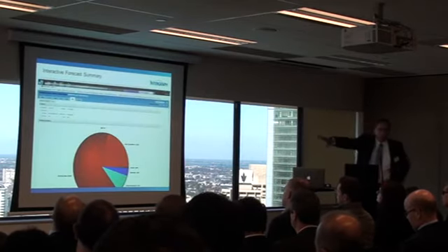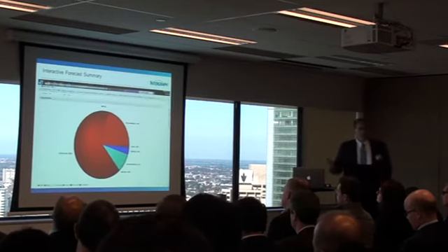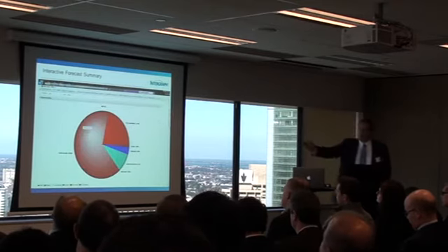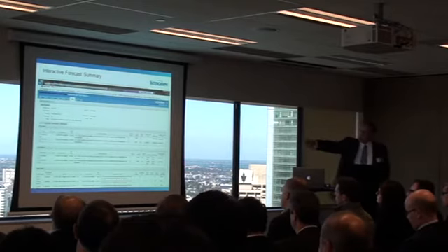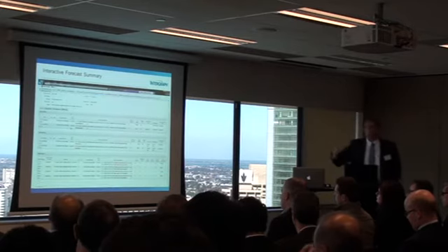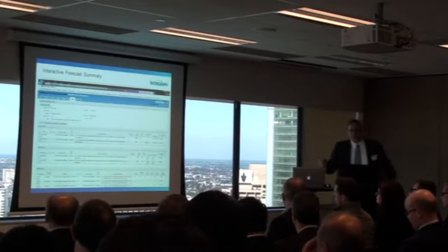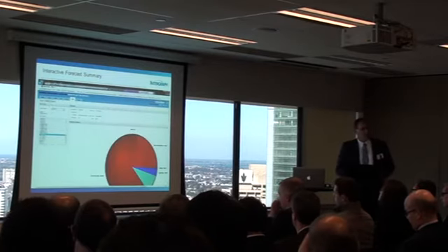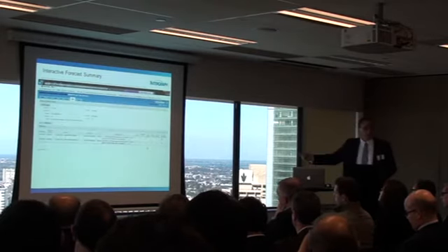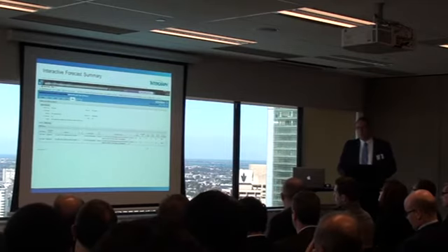So this project is in trouble. Based on the construction sequence in 4D, half of the project is in red. You click on the red, and then these are the items that are delayed. These are the items you need in 4 weeks, not the items that are delayed today. We already know, based on your schedule, these items will not make it where you need it in time.